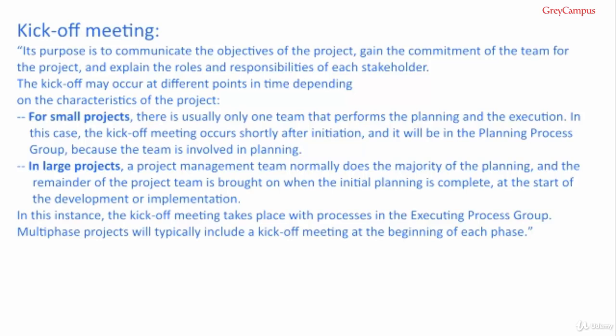The kick-off may occur at different points in time depending on the characteristics of the project. For small projects, there is usually just one team that performs planning and execution. In this case, a kick-off meeting occurs shortly after initiation, and it will be in the planning process group because the team is involved in planning.